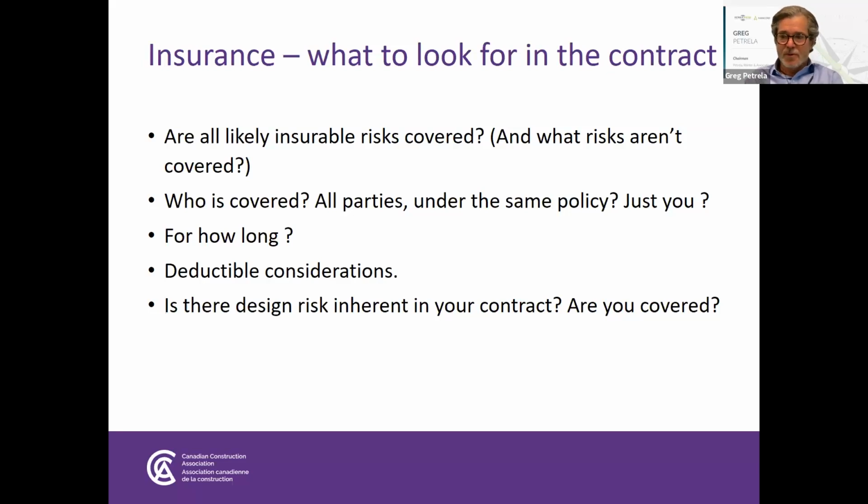On a high-rise construction project, it's not uncommon to find $100,000 or $250,000 deductible on either a wrap-up liability policy or on a builder's risk policy, which is the policy that, as you may know, insures the building against physical damage as it's being built until it's turned over. So those deductibles of $100,000 or $250,000 or more, the responsibility of those deductibles is buried somewhere in all of these contracts and or supplemental conditions.